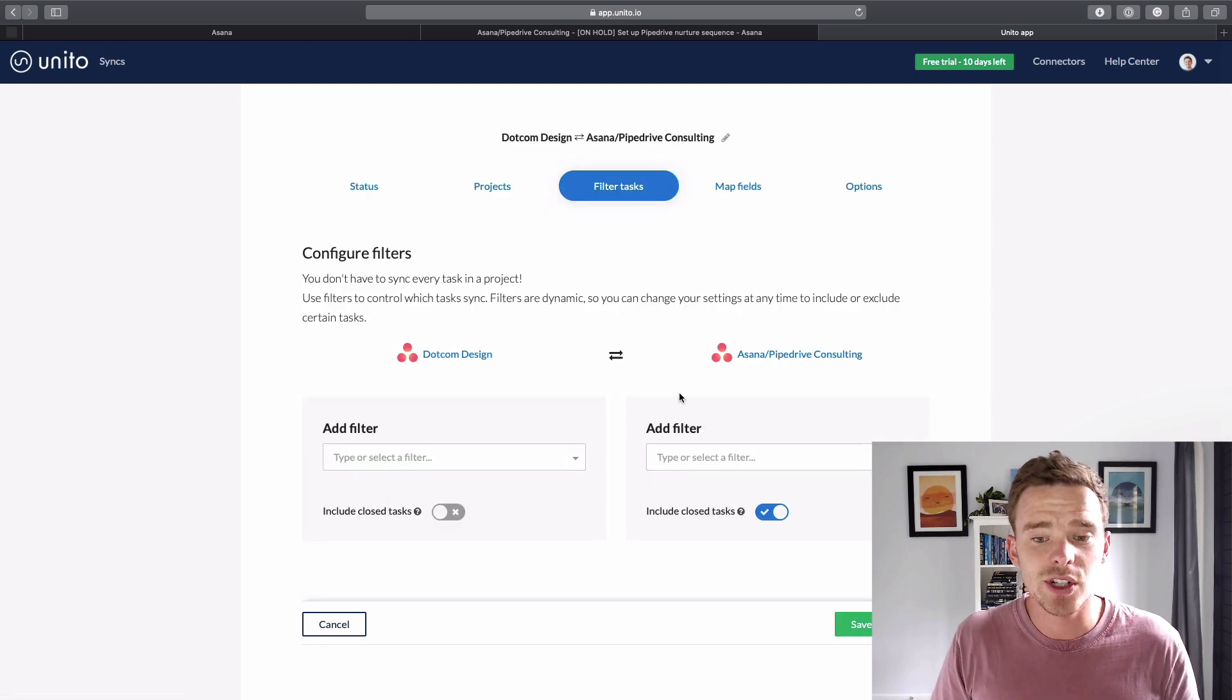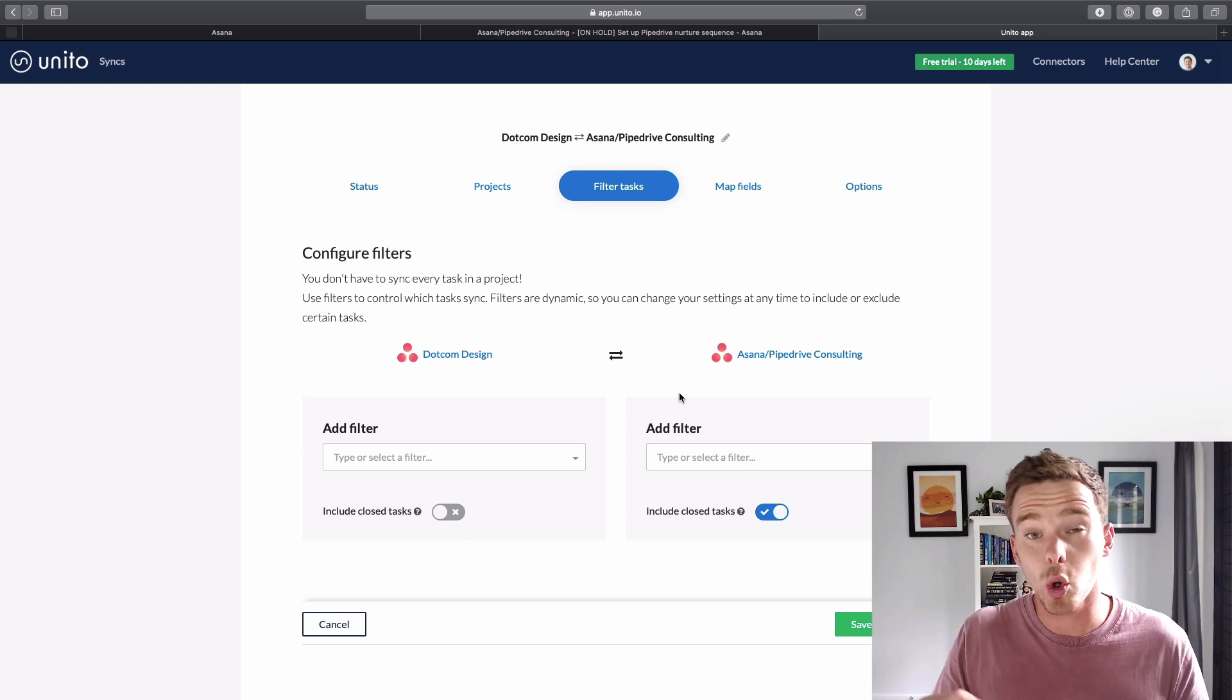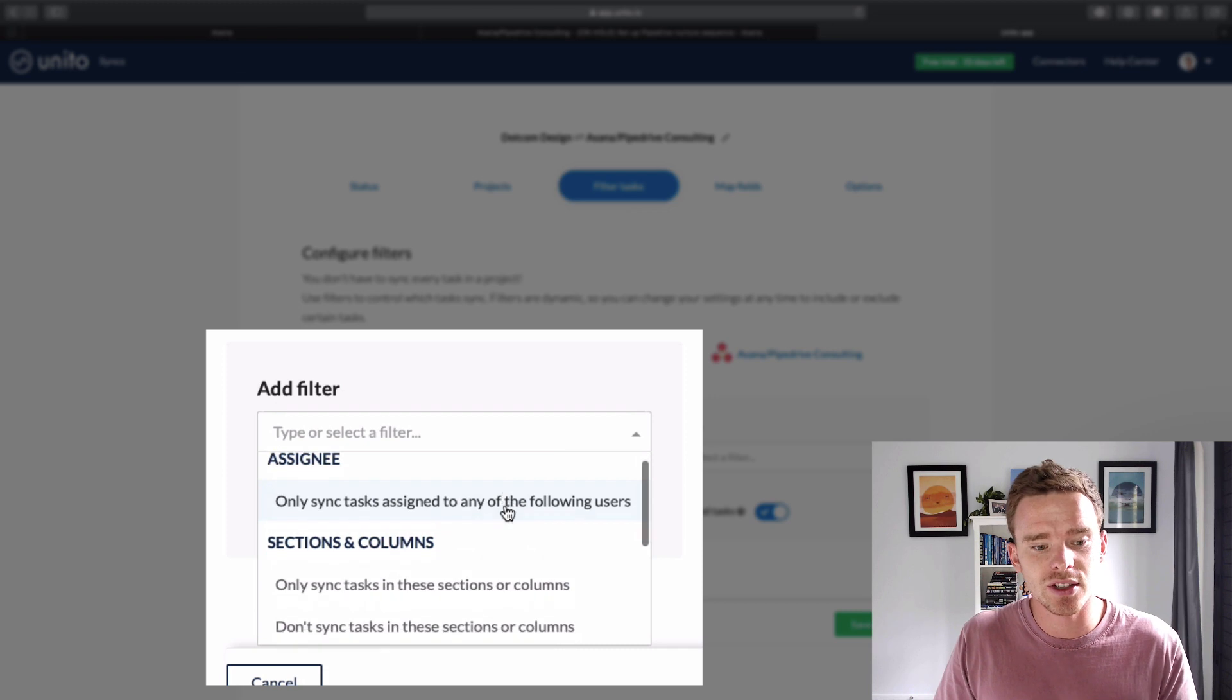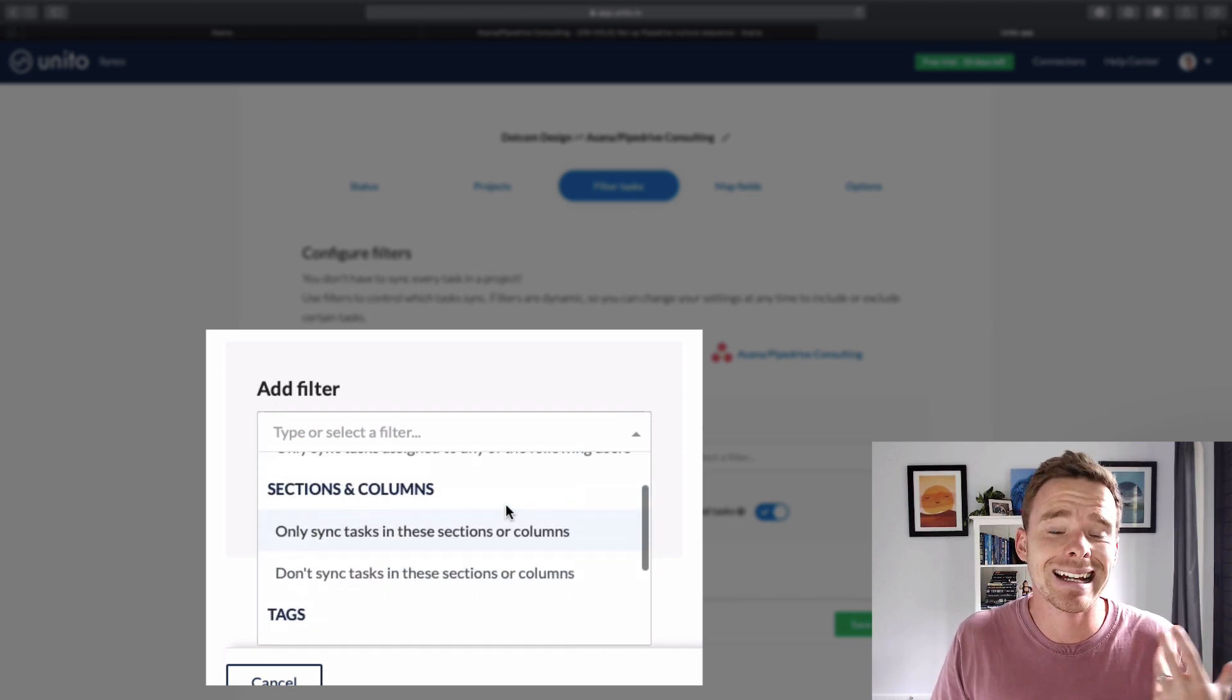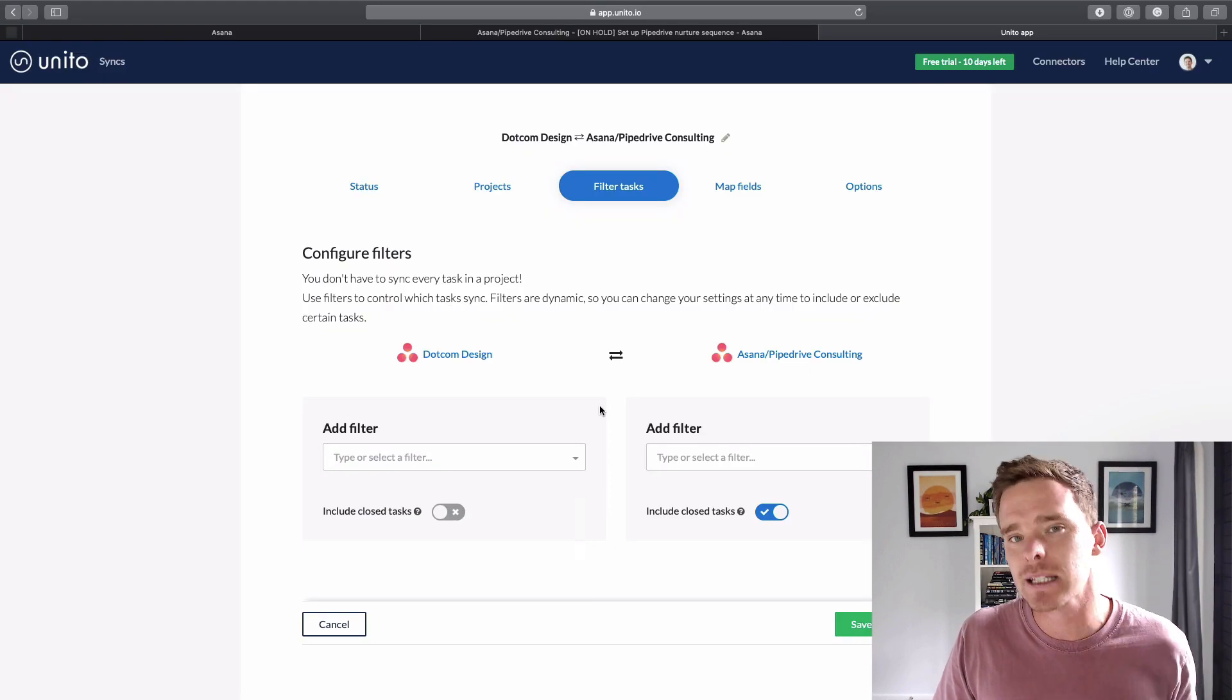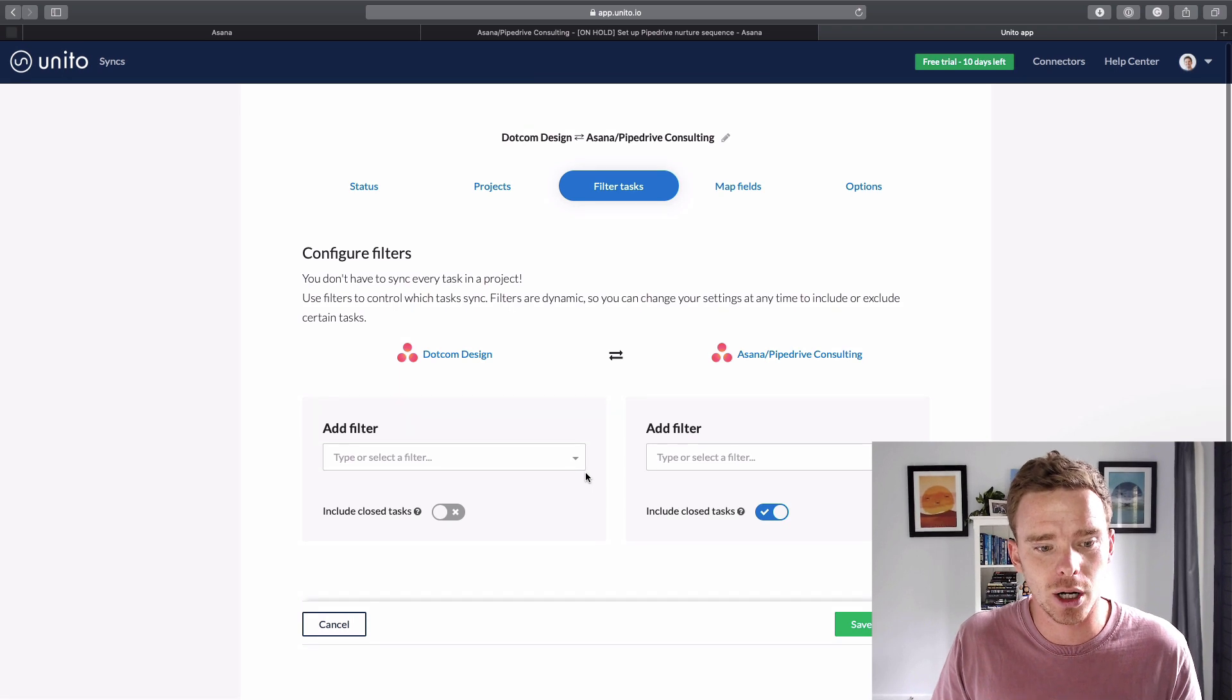When you are setting up your sync as well, you do have the option to set up filters as well. So maybe you don't want all tasks to sync across. You could have filters, for example, only tasks assigned to certain people or with certain tags in certain sections and columns could sync as well. So you don't have to sync an entire project. You could be more selective with what you choose to sync across.